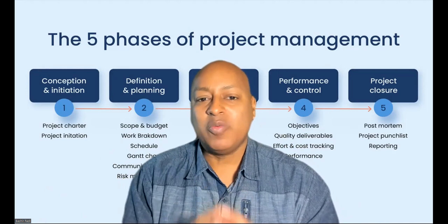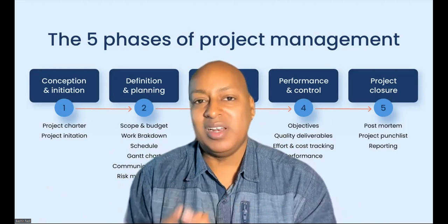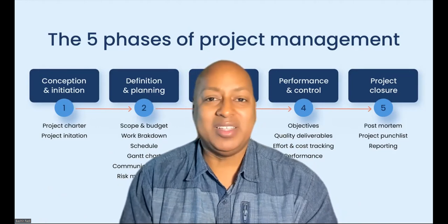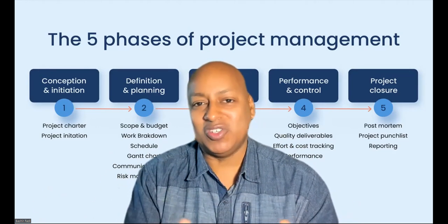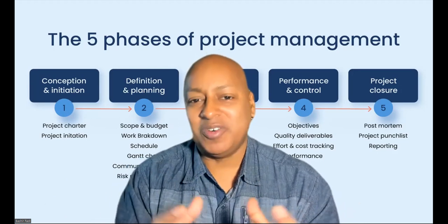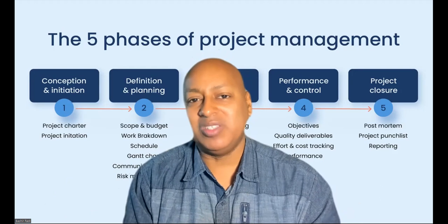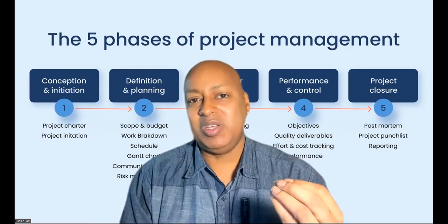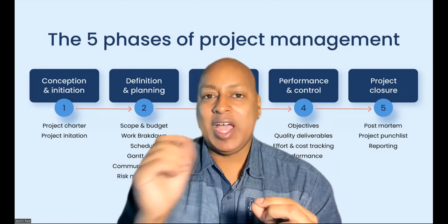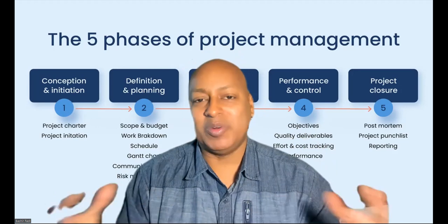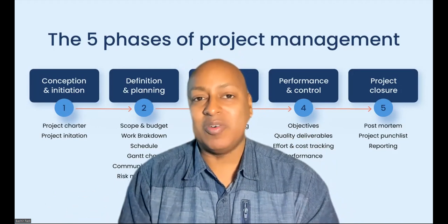Number 4, we want to establish problem resolution mechanisms. A lot of people use a ticket system or case system, something such as Jira or ServiceNow, or simple emails, or Slack or Teams, whatever platform or means of communication you use. Whenever a problem or a ticket needs to be created, it's created. And then how is it going to be resolved and how are we tracking the resolution? So it's not being delayed and delaying our schedule and increasing our budget.